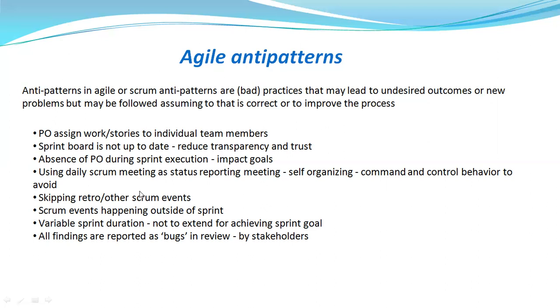Next, using the daily Scrum meeting as a status reporting meeting. Yes, people think the daily Scrum is a status report meeting. No. It is actually a kind of commitment you are giving, and a 24-hour plan you are giving in front of all your peers.